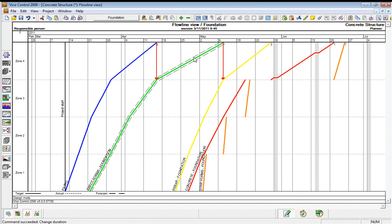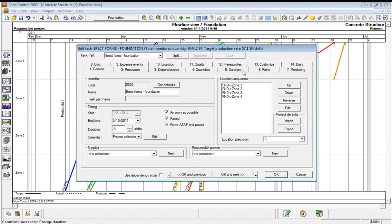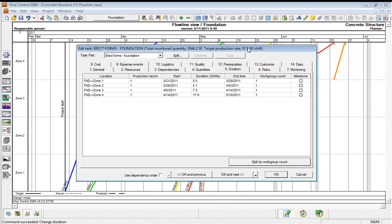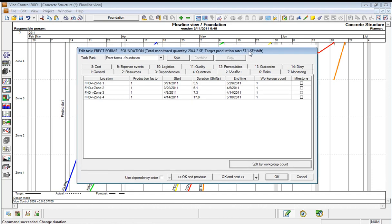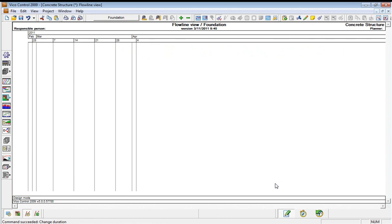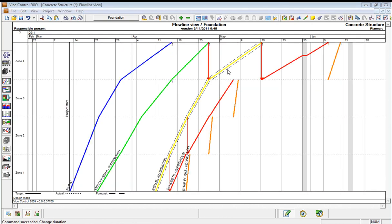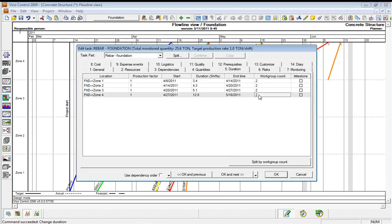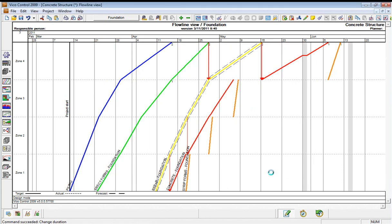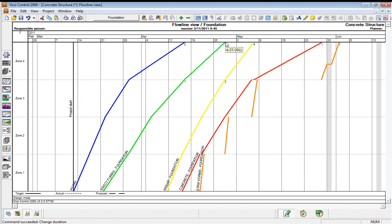But maybe in that last location for the formwork, there's a lot of formwork in that last location. I didn't adhere to my rule and make that location a similar size. So I'm going to have to go in and say in location four, I'm going to have two. And in our location four here, I'm going to have maybe four.